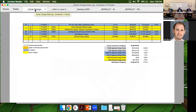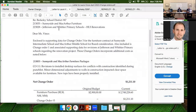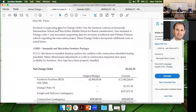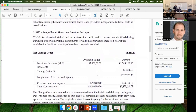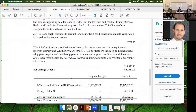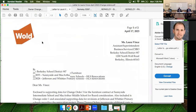So we've talked about district change order 144. We've talked about this for a couple of months now, with regards to the lighting on the site and the request to improve the light levels, both here on the north end between the district office and the building, and then as well on the south end and the east side of the parking lot. So we've worked through 3 iterations of pricing on this and designed to improve light levels, reutilize as many of the poles and lights as we can, and we believe we've come to the best option.